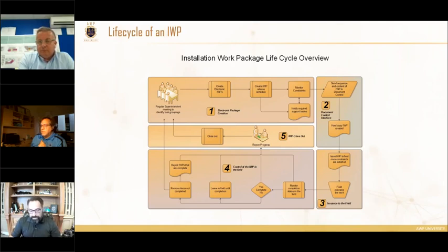Those superintendent meetings or general planning meetings need to be held to capture those scopes and bring them forward through an integration across the different crafts. These craft meetings are multiple trade. They're not single disciplinary, which is key. Get all the disciplines together in a single room, start identifying scopes and bringing them forward so that we have an understanding of who's going to be what, where, when, and doing what, is kind of the big key in that.